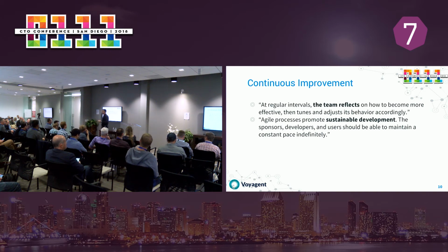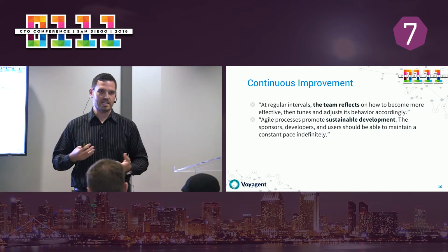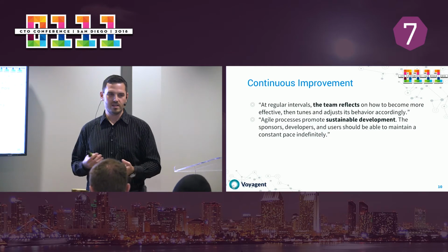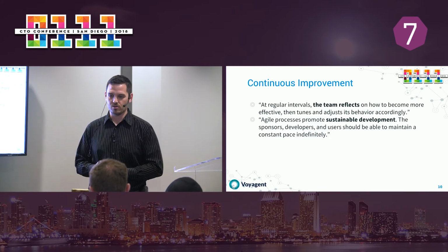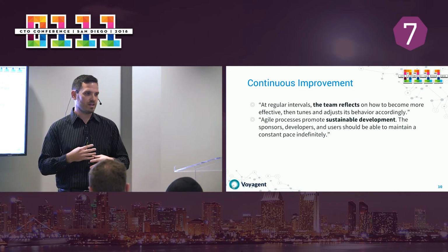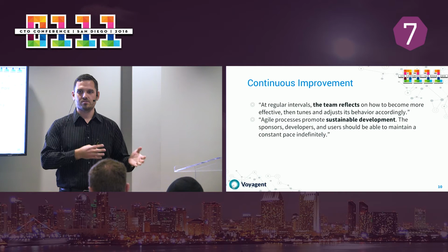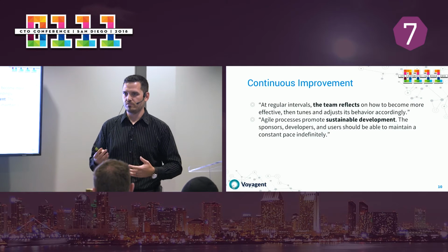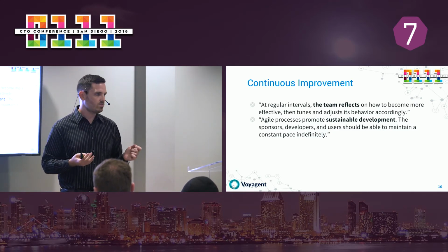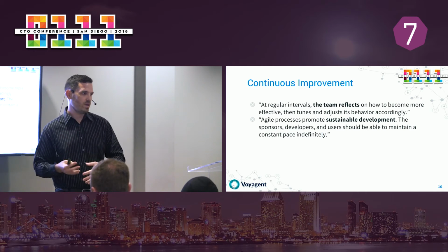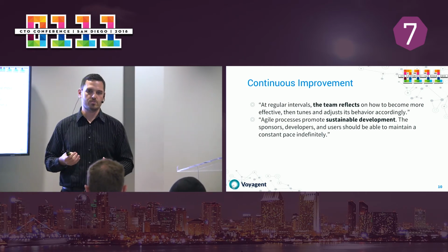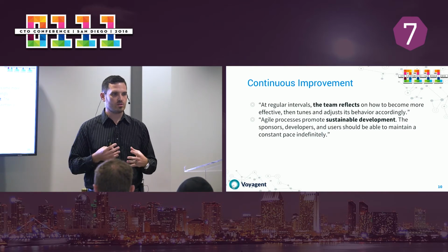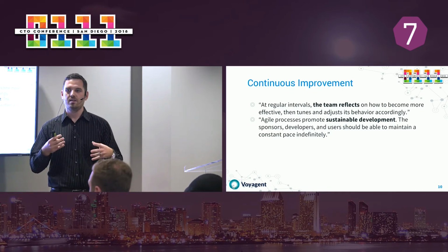And a lot of folks don't quite understand the value of the retrospective. When I get in there and we actually hold a retrospective and we start creating what I call a program for continuous improvement, things start to change very rapidly. So a couple things you can do is have a suggestion box, right? So throughout the sprint, if there's anything that isn't working, if there's any challenges that you face through the execution of that, you just take a note, right, and submit it to a wiki page, or even just take a note somewhere. But when you get to the retrospective, you're sort of reviewing the things that you've already said had gone wrong. And then you create a program of accountability and traceability, okay?